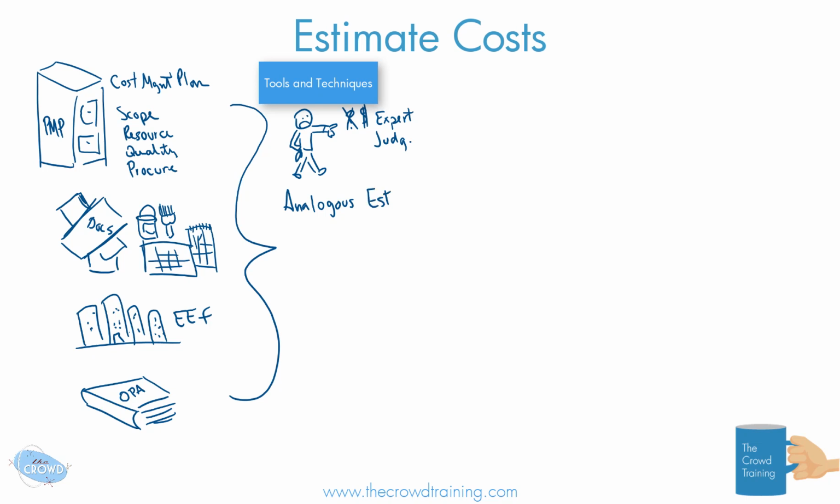So this is that, for instance, if we planted a tree one year and it cost us about that much, then if we were going to plant other trees this year, then we can guess that, yes, it's a different situation, it's a different location, maybe a different supplier, but there's enough that we can at least go off of to get us in the ballpark, and we can use the analogy to help us get an estimate. My trees kind of look like bombs, but okay.